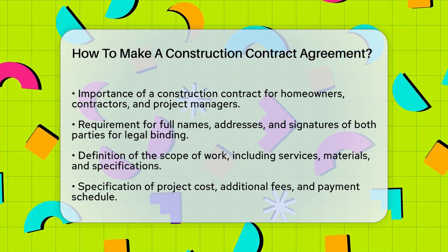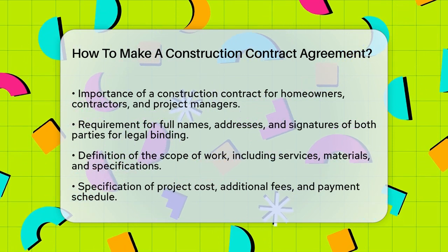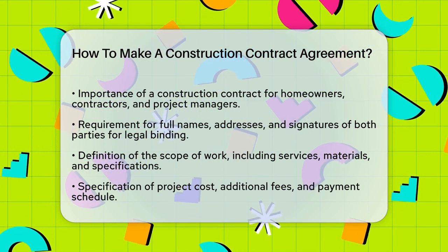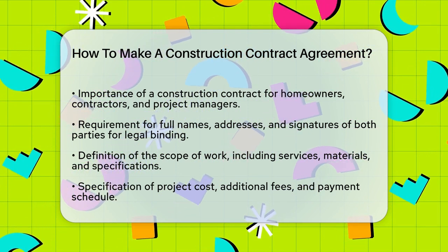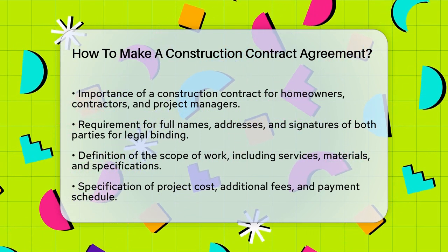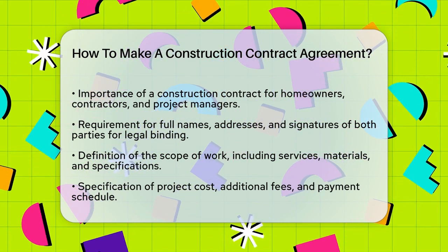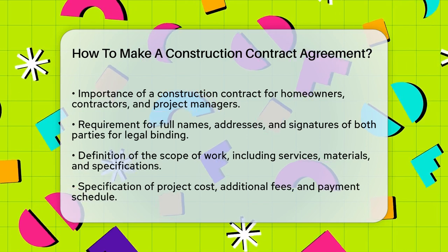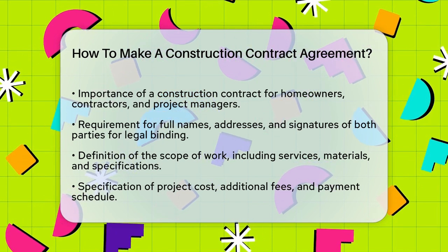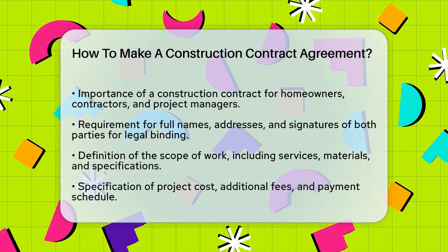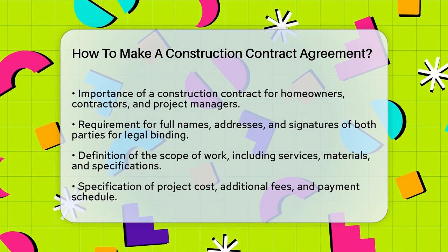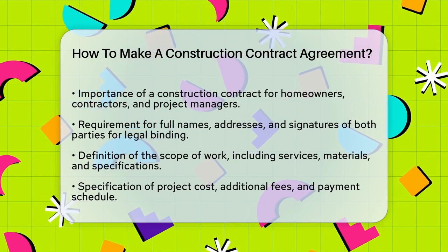First, let's start with the basics. A construction contract needs to include the full names, addresses, and signatures of both parties involved. This might seem obvious, but it's essential for making the contract legally binding. Without these details, the contract won't hold up in court if there are any disputes.